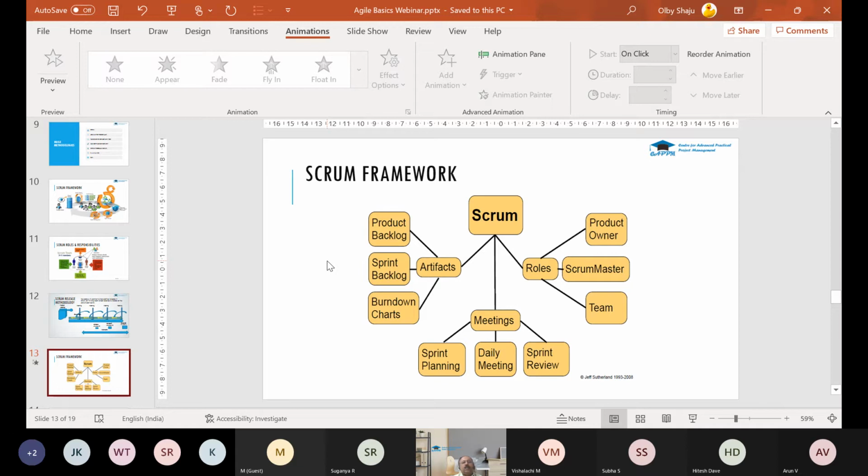What you're going to do is take the user stories and the features which are not completed in the current sprint and move them into the next sprint. So you're not extending the time. You're taking the work that has not been completed in this sprint to the next sprint.